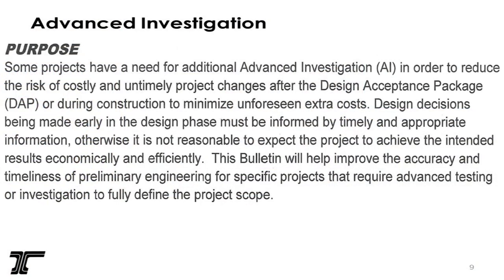So I think we're about to get the hook. There's 3 topics that got sort of big in this phase of scoping. One was advanced investigations. Headline version of this is, let's say you do your scoping, you balance your risk, and it's just obvious that there's some data, like what's underneath the pavement, where you have to do some geo explorations maybe. So while we were in scoping, there was a lot of work happening statewide about this concept of advanced investigations, how to fund it, when to do it. So that's a phrase to keep your ear out for.